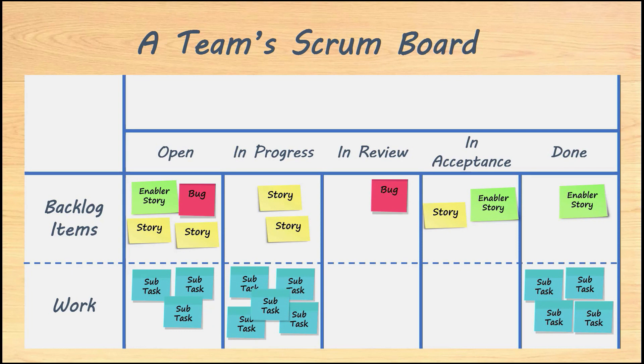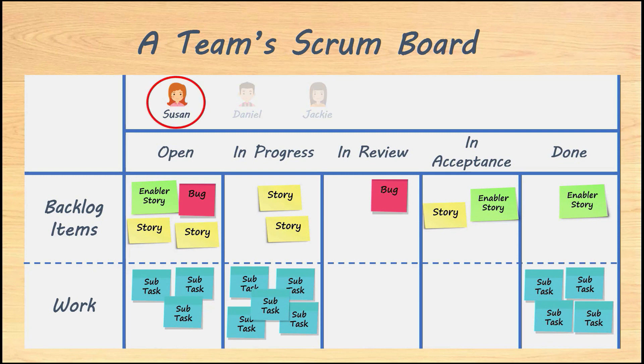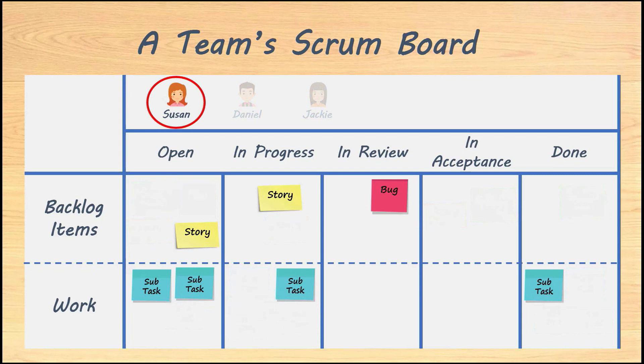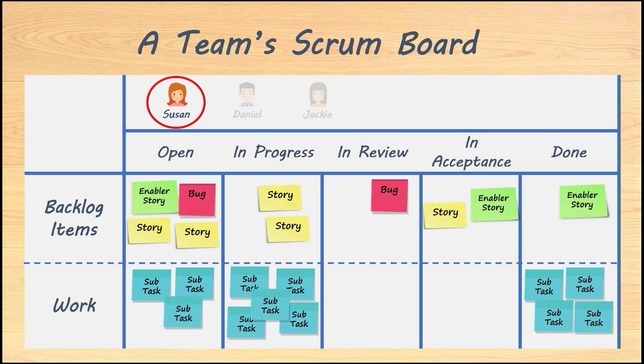Now let's talk about another interesting and practical aspect of the board. The ability to work as an information radiator is essential as a supporting tool for the daily stand-ups. It's precisely under that context that I propose creating a set of filters that are focused on each team member's perspective. Each filter represents the work that is currently being done, or at least assigned, to each team member. When you click the filter, you will see in the work streamline all the subtasks that are assigned to that team member, while checking the current status of each. On the other hand, in the upper streamline, one will be able to see all the backlog items that the team member is contributing to as a consequence of the subtasks that have been assigned to him. Also, and just like for the subtasks, the current status of each backlog item will be automatically visible. This approach allows to understand, among other things, if each team member is focused on too many things at the same time, which, as we all know, is one of the biggest sources of waste.